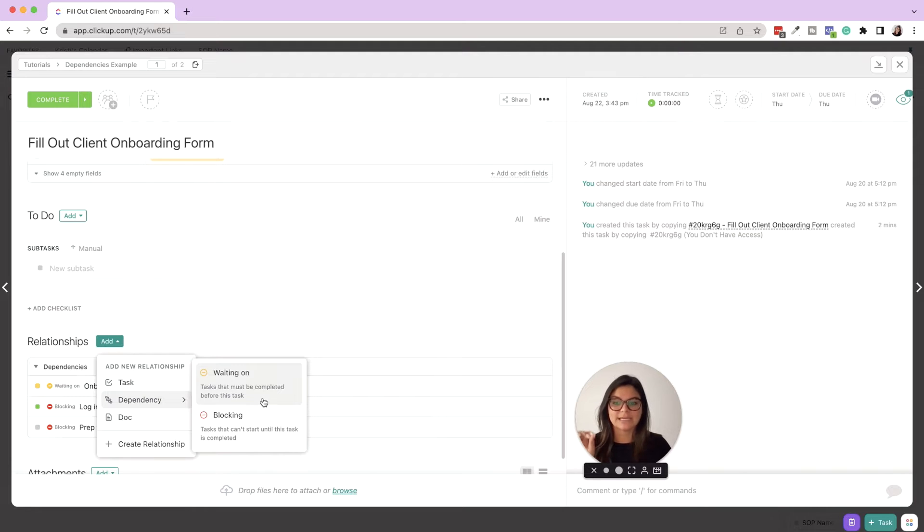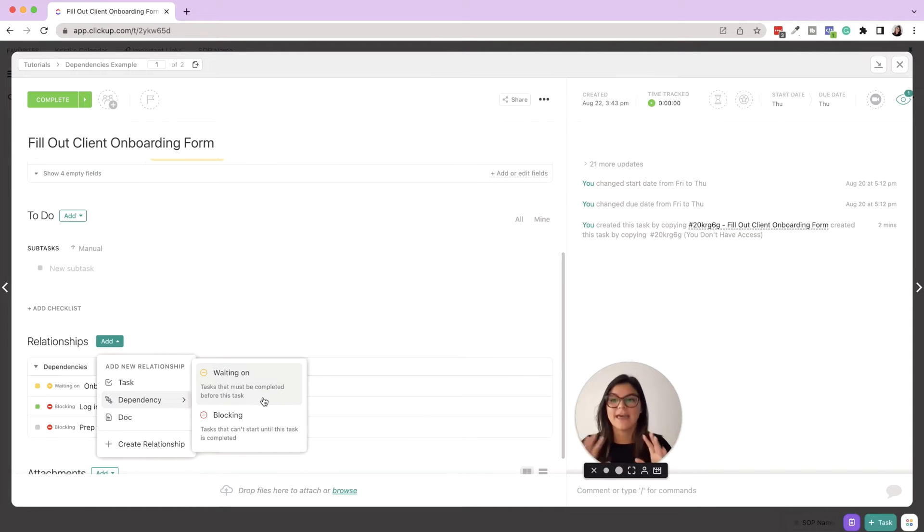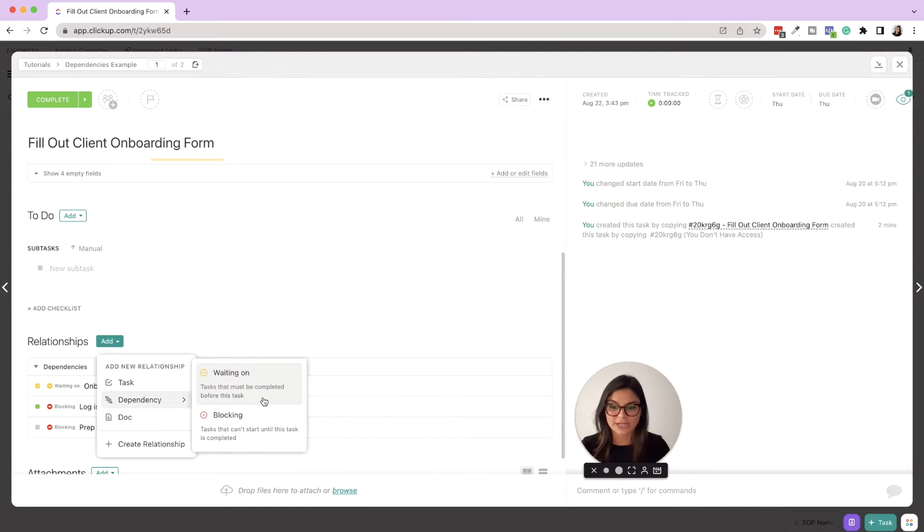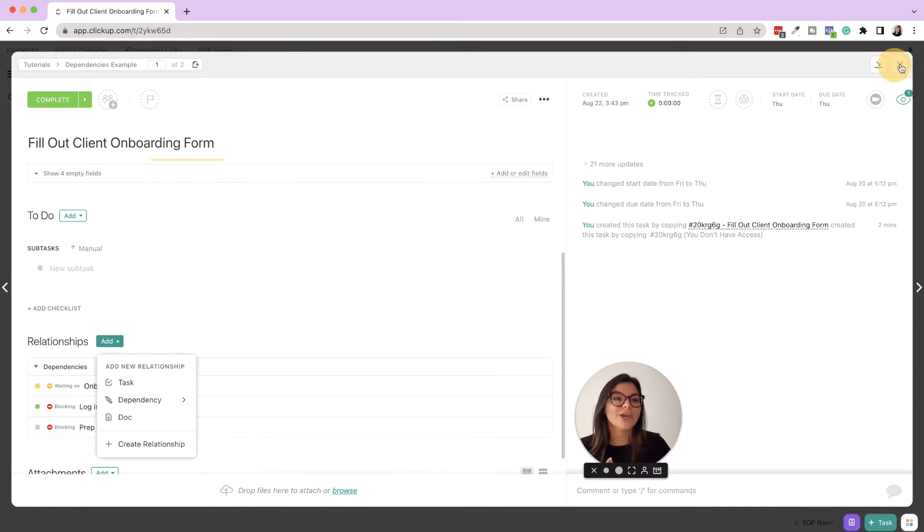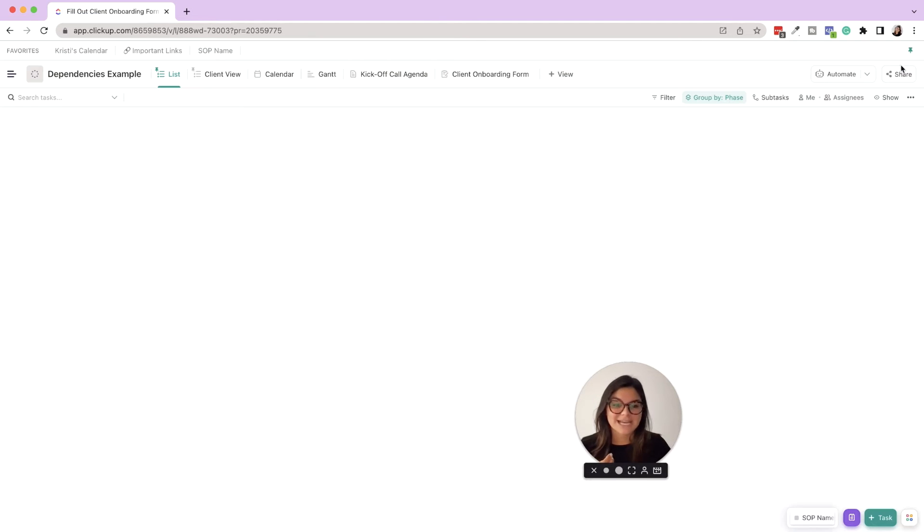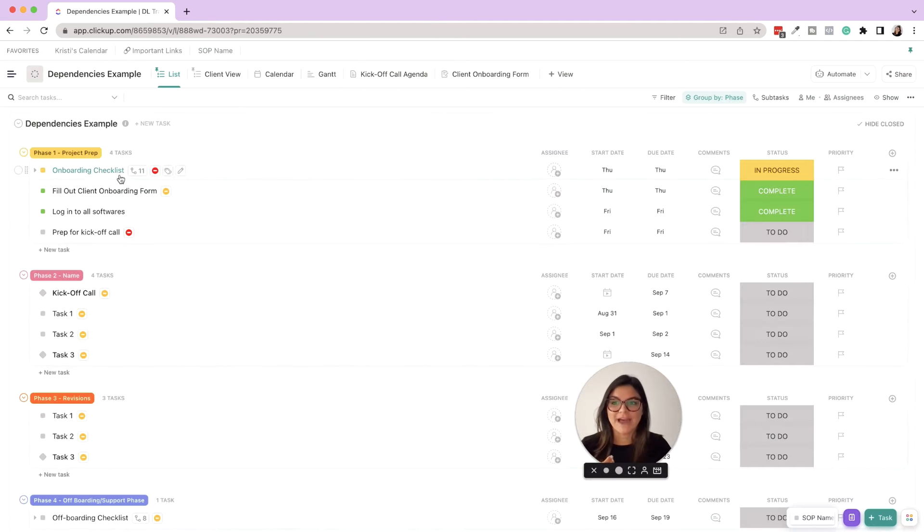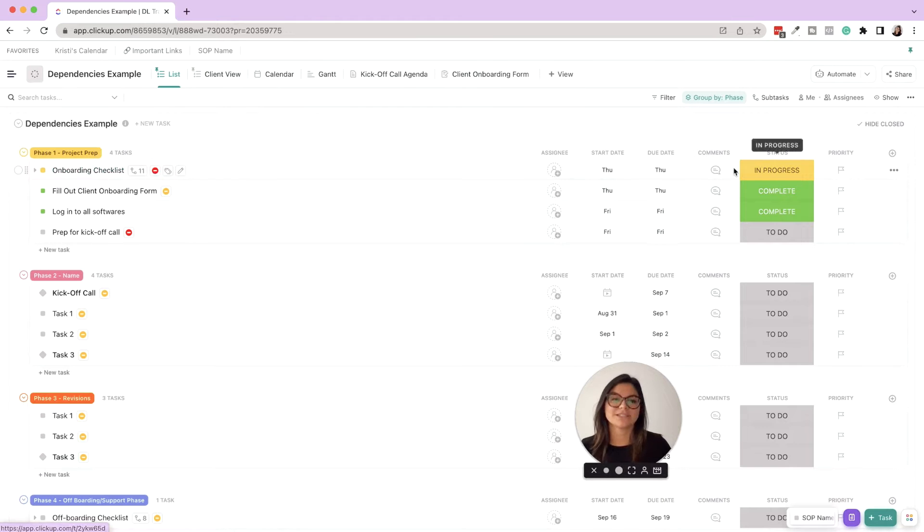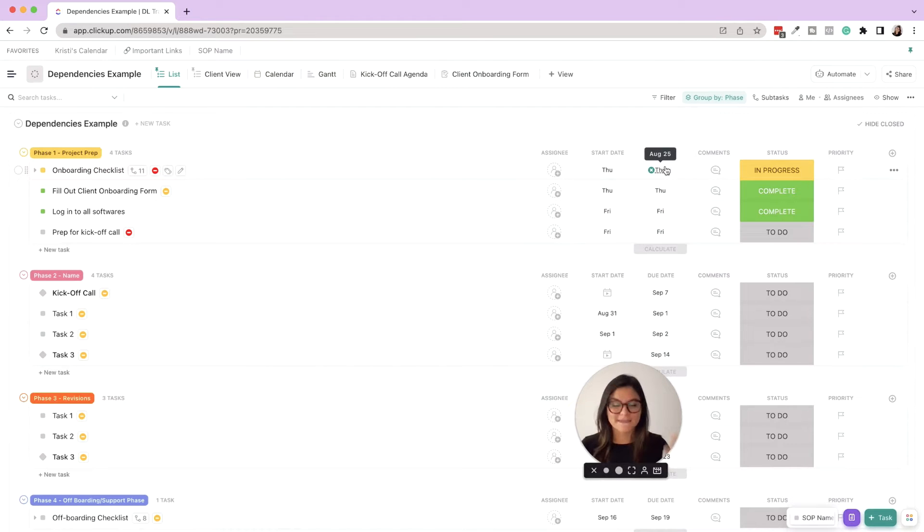So you'll see here, waiting on is a task that must be completed - there is a task that exists that must be completed before this task can be done. And then blocking - this is tasks that can't start until this task is completed. So if you have a task assigned to you that has a red block, you're like okay I am blocking someone else from getting their job done. What's the due date on this task? Because this project is not going to move forward without me doing my job.